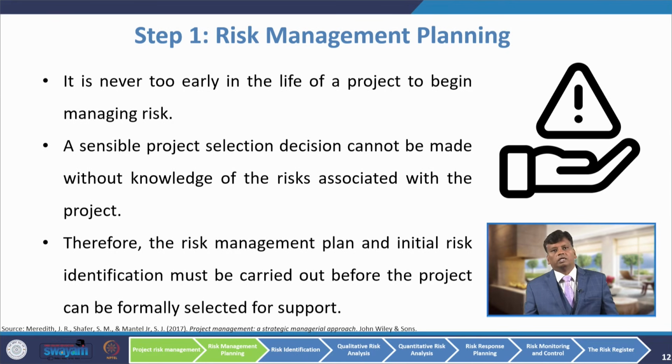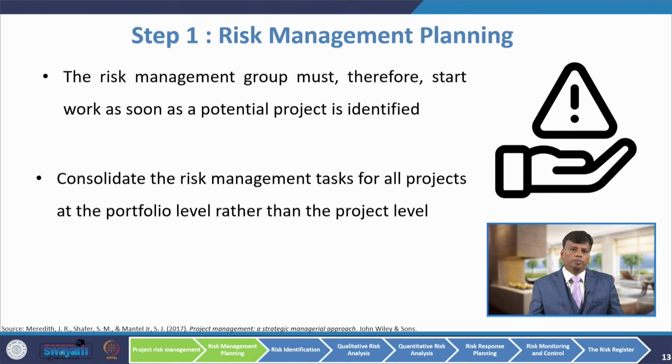Therefore, the risk management plan and initial risk identification must be carried out before the project can be formally selected for support. The risk management group must therefore start work as soon as the potential project is identified, then consolidate the risk management task for all projects at the portfolio level rather than at the project level.